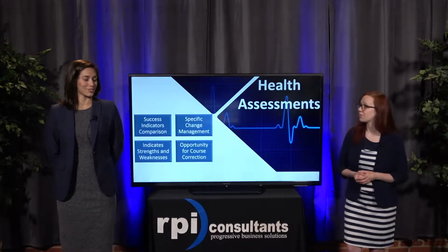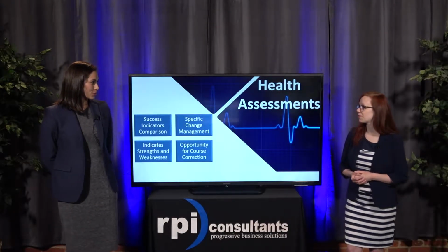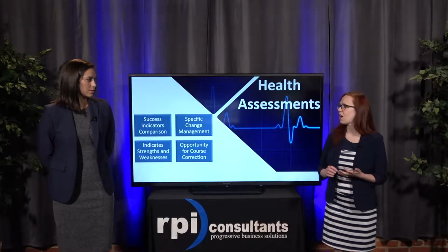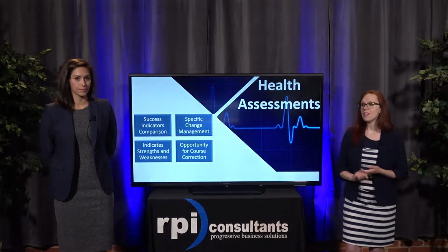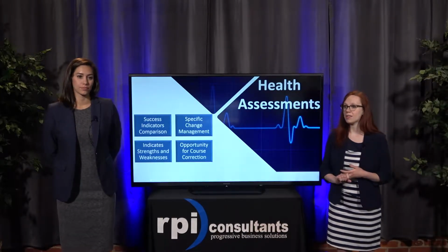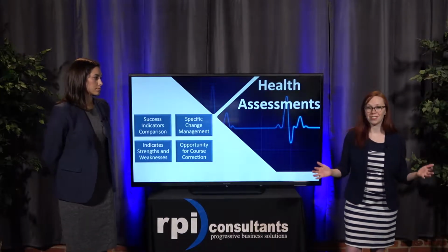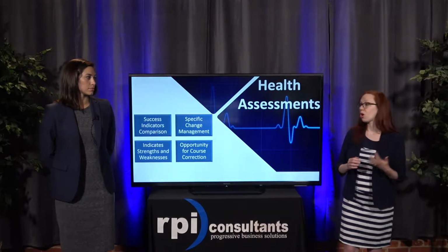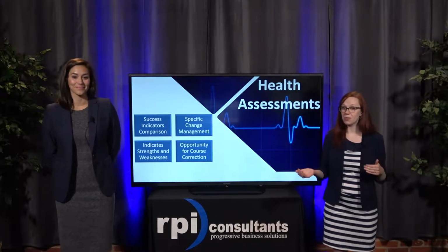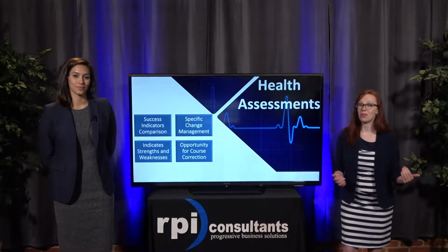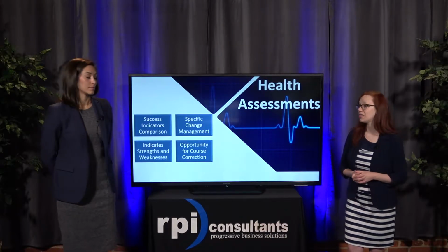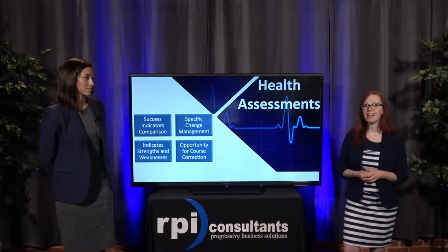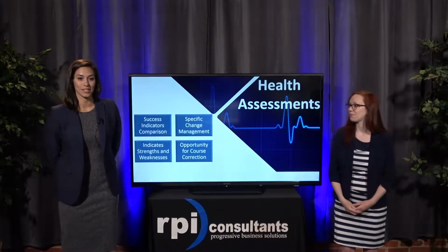Yeah, and last question. Sure. Some of these critical milestones, what would be a critical milestone, like testing? Yeah, so generally a project has at least 3 testing phases. Those are great opportunities to take a pause and look at how the project is performing. Also, we like to go ahead and do them before a go live, especially if you have a multi-phase project, and after a go live in a multi-phase project. That's a great opportunity to assess how the team handles the stress that comes along with a cutover and prepare for your next phase. Makes sense.